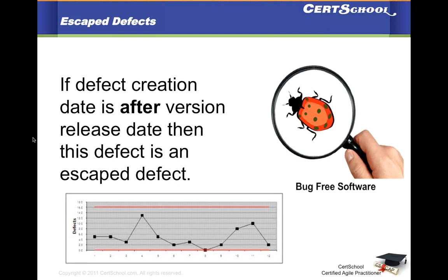However, there are teams like myself where we draw that line in the sprint itself. If you are working on a story and you have closed that story, and later on, even though you haven't released, you find a defect pertaining to that story, that defect is termed as escape defect because it actually escaped from the story. It should have been caught in the process of closing that story.